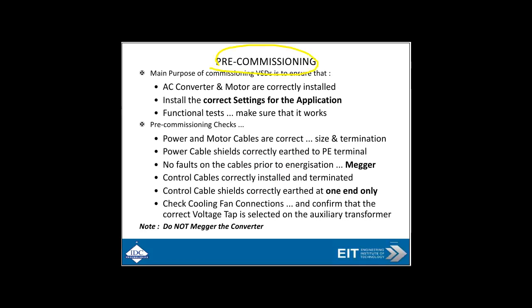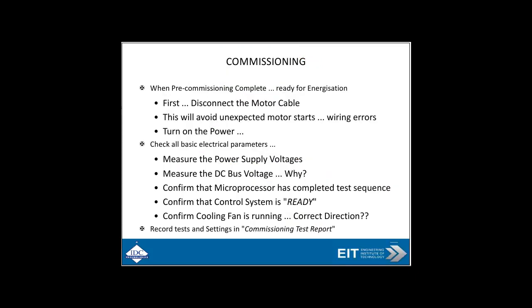Pre-commissioning: make sure your motors and drives are correctly installed with correct settings. Pre-commissioning checks include verifying that power and motor cables are the correct size and properly terminated, and that shields are correctly connected to the power earth terminal. Check for faults on the cable prior to energization using a megohmmeter — but obviously do not megger the converter electronics.